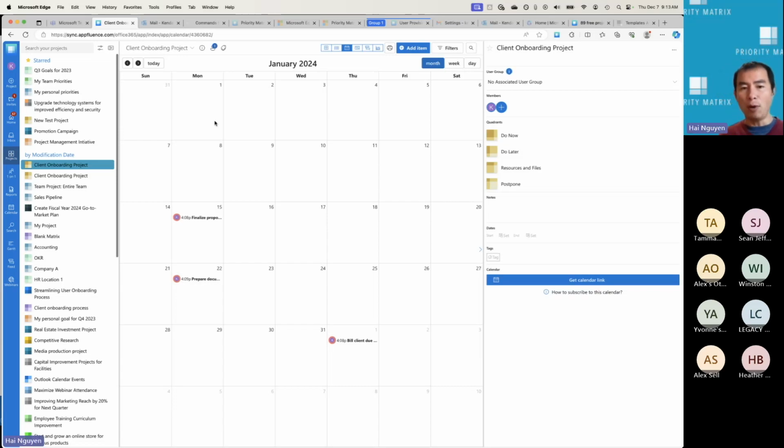So what happens is that by doing this and by launching it from wherever start date it is, you can actually not worry about creating the tasks and worrying about tasks not getting done, right? Because all the dates will actually propagate forward for you. And so when you create that initial template, make sure you set the due dates appropriately. And if they are dependent on each other, make sure you create all of those time stamps. So then, when you're launching a new project, all the information is there.